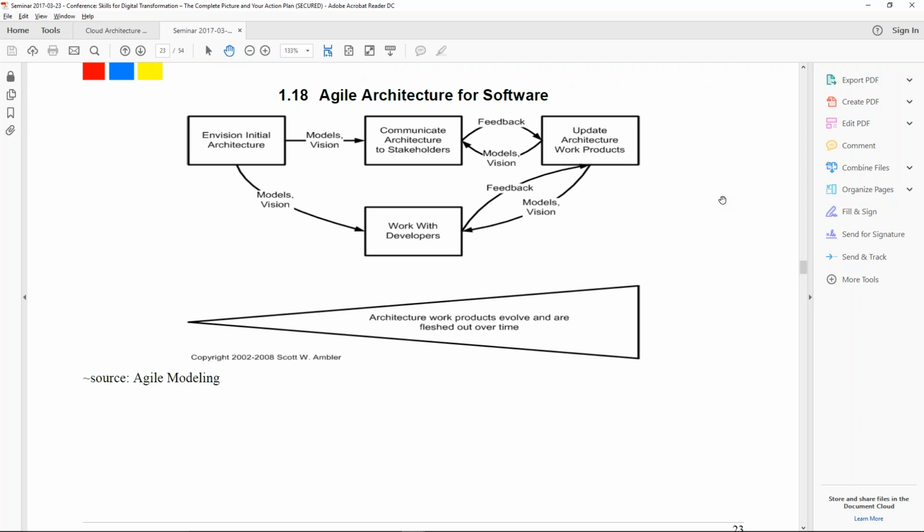What we want is, here's my best guess for what might work. Let's try it and see. And let's find out quickly how well it works by setting up automated performance testing, by setting up automated load testing, those kinds of things. Or we say, okay, instead of giving me an architectural design, what we'd like is to get three architectural designs.